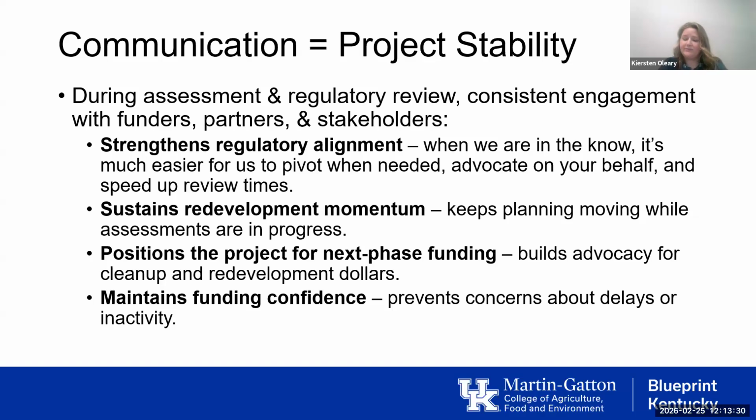So like if the phase one doesn't align with when you're actually going to transact the property, then that might be an instance where we say, okay, we're going to have to hold off on this one for a little bit just to make sure it gives you enough time to purchase the property. Or, hey EPA, we submitted this quality assurance documentation to you, but they need this in order to move forward to the next phase of funding. Could you make this a priority for review? We can have all those conversations, but not if we aren't in the know. So that communication is a really important part of this.